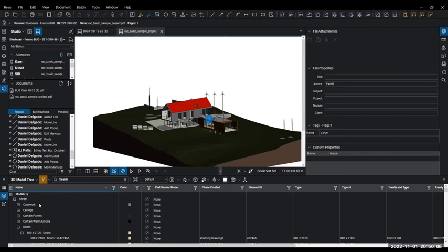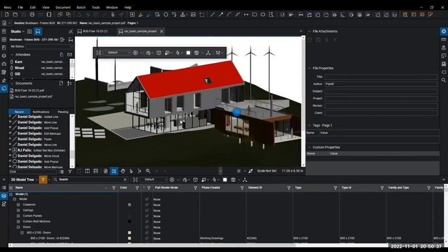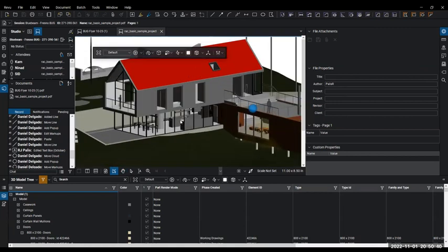Well, I think a good scenario is that you guys can do a sample of a 2D, and this is what I've done in the past too, to see how accurate a 3D model-based takeoff is. You would do a normal 2D takeoff of, let's say, the number of windows and doors, and then maybe a takeoff of the square footage of a floor. Then you would take a 3D model that's available to you, match up your 2D takeoff, and see what you get from a 3D model takeoff.